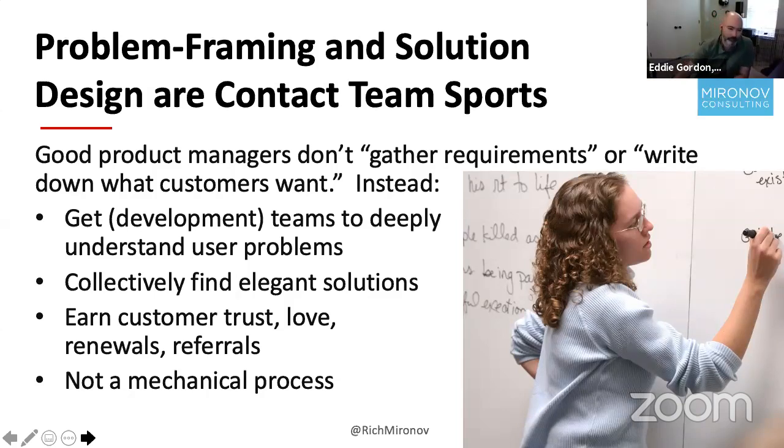I think it depends a lot on size. So for instance, I expect every team to fix some bugs in every sprint, right? And we know we're going to do that, and we allocate 10 or 15% of our bandwidth every sprint to fix some bugs. And changing our mind about which bug we fix is not a big deal usually if we take similar size stuff, particularly if there's some new problem or support's reporting a lot of issues. On the other hand, changing our corporate strategy or our product strategy probably is a big swing of the wheel, turn 90 degrees one way or the other. And if we do that more than once every quarter or two, what we find is we're getting nothing finished.